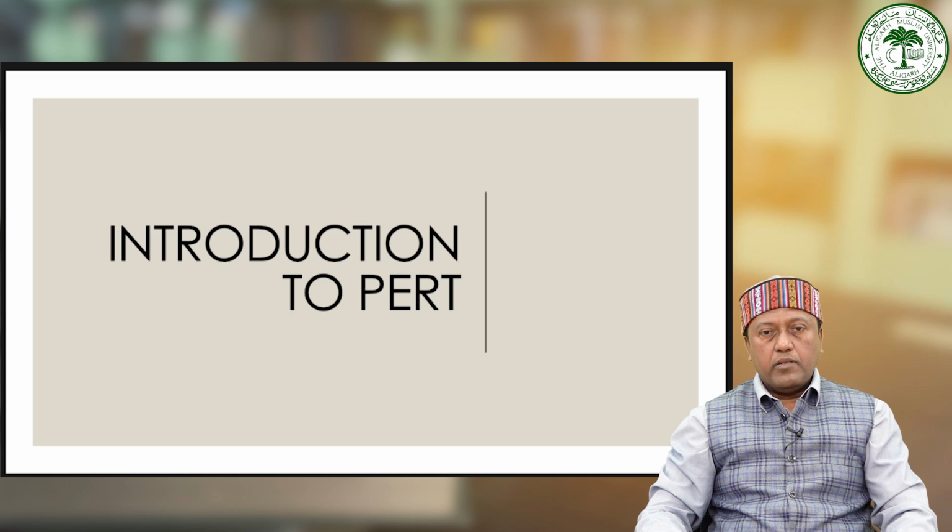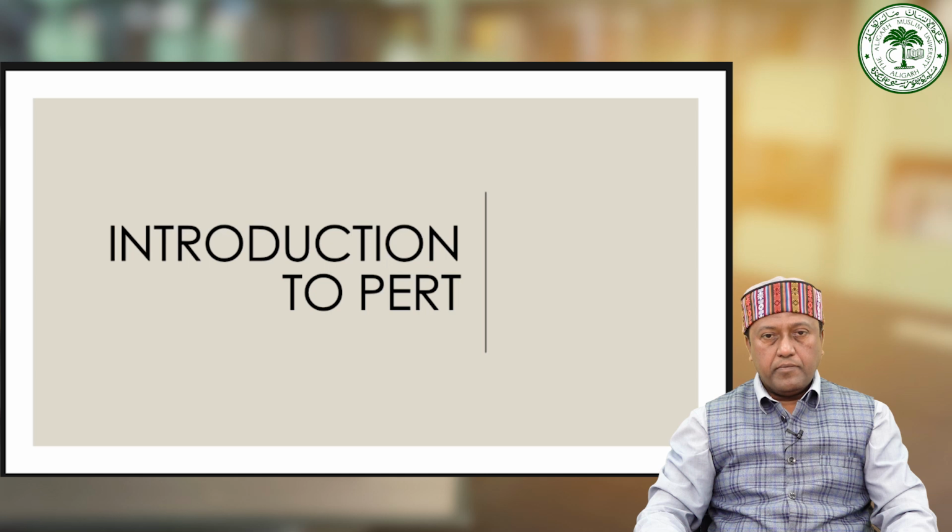The PERT method entails several key steps, beginning with the identification of all essential activities within a project. Subsequently, these activities are sequenced and arranged in a flow diagram to establish their order of execution. Duration estimates are then assigned to each phase of the work to be undertaken.